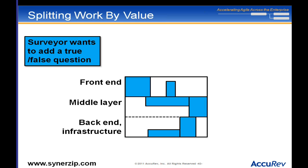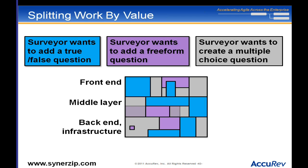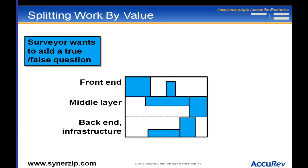If true/false is all I ever need, then actually doing the other parts is a waste economically. If it turns out I do need the other two stories and have to rewrite some code because assumptions were wrong, that's fine — because the money it costs me to go back and change that code is going to be a lot less than the additional revenue I get from focusing on economic efficiency. So splitting by value is a very important topic.